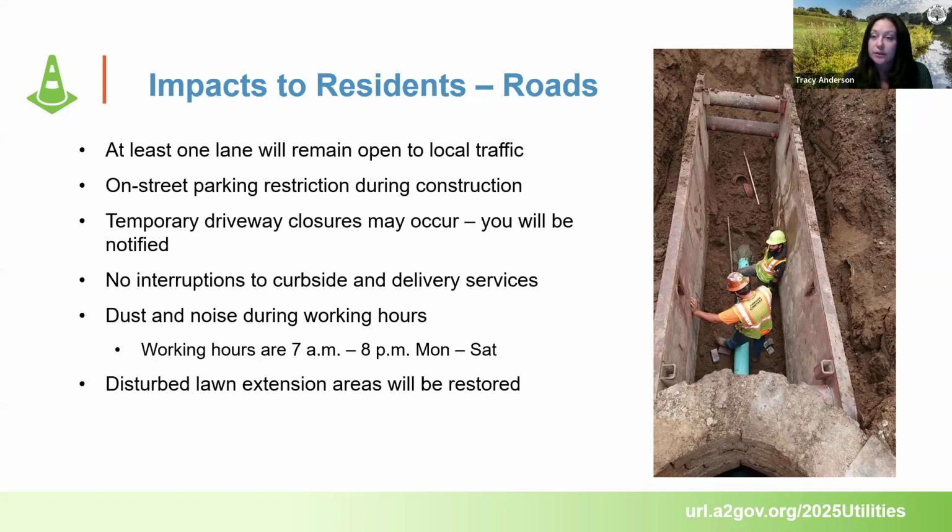Inevitably there is dust and noise during construction, so be watchful for that during the working hours. And FYI, the working hours do include Saturdays. And then any disturbed area in the lawn extension will be restored. The project is only in the city right-of-way, which is basically back of sidewalk to back of sidewalk. So everything will be within that, and any grass areas that are disturbed will be reseeded after the